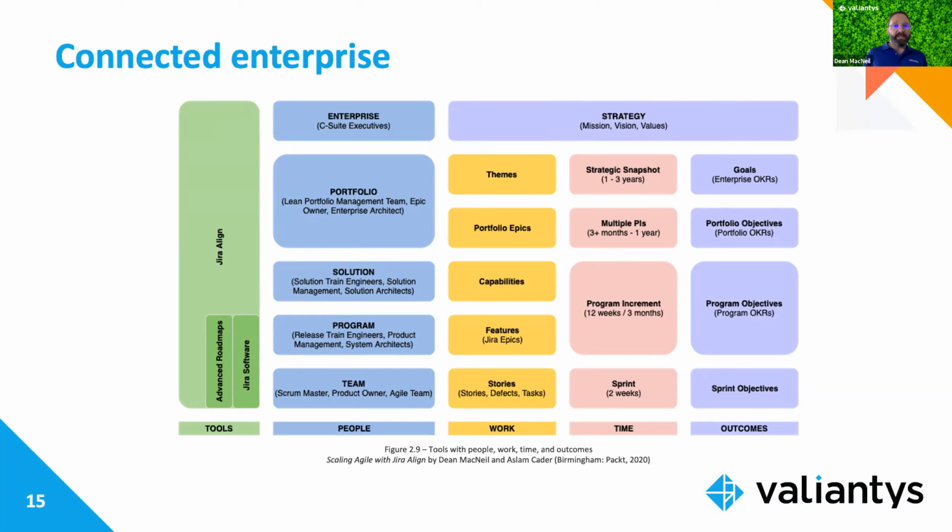You've got great visualizations. Look at that dependency visualization alone. That has helped countless organizations realign, because when you first start an agile transformation, your tendency is, hey, let's group our program teams into functional areas, like our old waterfall way. Well, you're going to see how that's not good, because your dependency wheel is going to look like a dense spider web, and it's going to be all red and crazy. That has actually helped educate organizations that we actually need to align around value, not around functional. We need to be cross-functional agile release trains and cross-functional tribes capable of delivering features within business quarters with minimal external dependencies. And then you'll see that dependency wheel goes from that dense spider web down to something quite manageable. So all of these visualizations are helpful for your stages of the transformation journey.